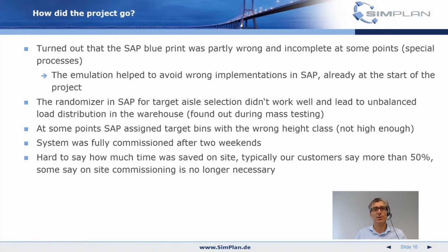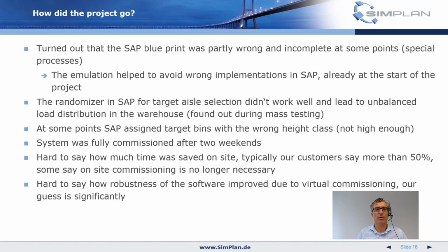We usually do around 20 high-level emulation projects a year, and our experience and experience of our customers using the technology is they all say at least that 50% of the time on site is reduced. Some even say commissioning on site is no longer necessary. So that's the bandwidth we hear.